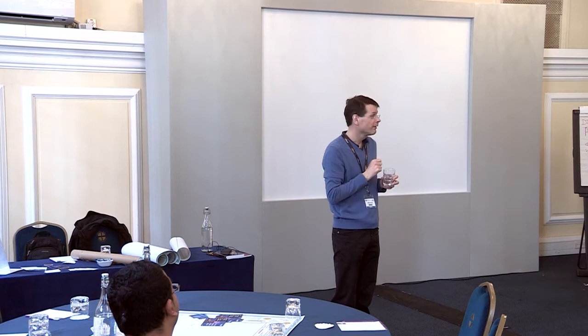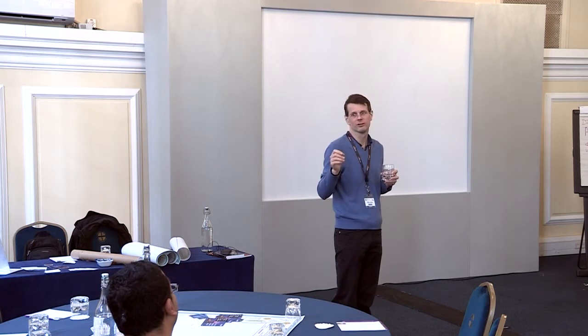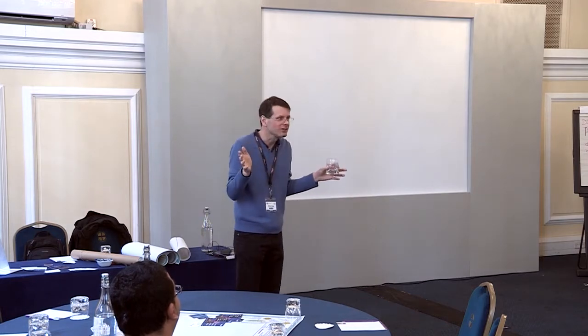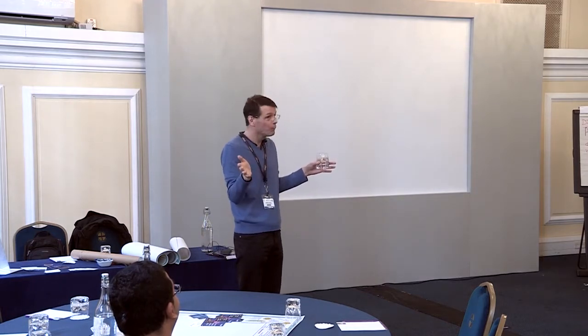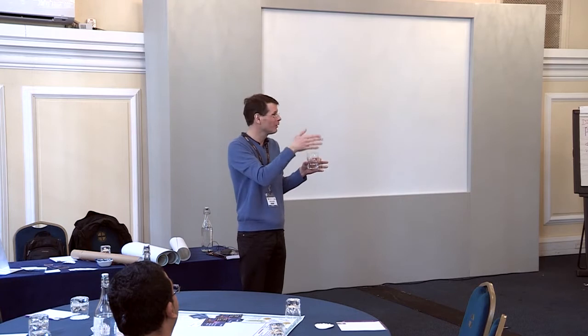I had a friend once who was Scrum Mastering at the BBC, and every 2 weeks they held their retrospective, and every 2 weeks, without fail, the team came up with an idea for improving their test coverage. Their test coverage stood at something like 98.6%. But every retrospective, the team wanted to talk about test coverage and how they could get it higher. At 98.6, increasing it even by a whole percent wasn't going to give you a great deal of improvement. And they'd fall into a trap where they hadn't got negative, but it just kept going over the same ground. Sometimes you need to break it out, and sometimes the way to break it out is to jazz things up, try something different.